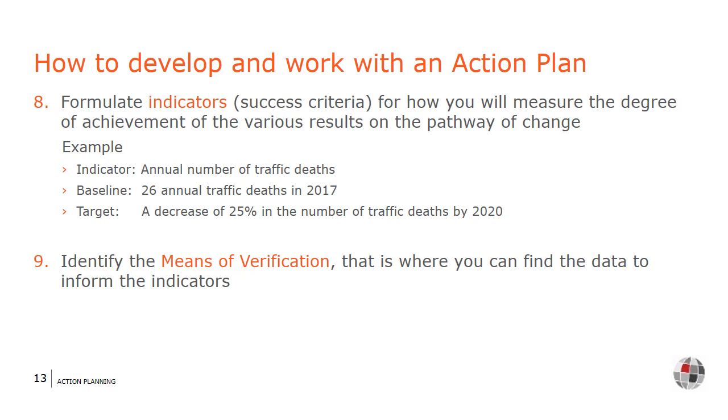Linked to the indicators are the means of verification, which tell you where to find the data to inform the indicators. If you cannot find reliable means of verification or cannot identify ways of obtaining the required information, you will have to find other indicators.